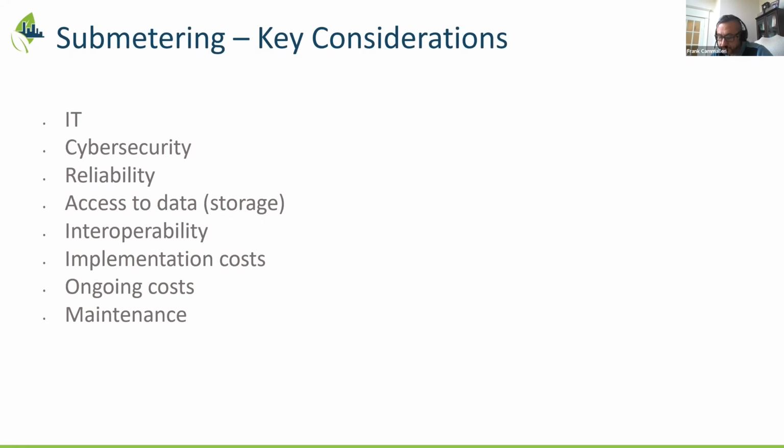I have a few pieces of advice that maybe you've already thought of, but maybe this will be a new idea. First would be developing an implementation plan with a solid business case: which are the target facilities that you want to start rolling out, and then gradually work away from there. It depends on what your priorities are. In our case, it was energy competitions, or if we have major retrofits planned and we want to do measurement and verification on it, then that would set those facilities a little higher in the priority scale.